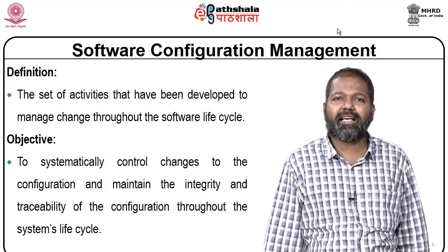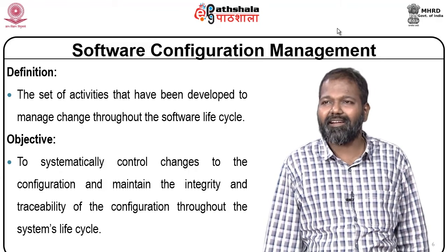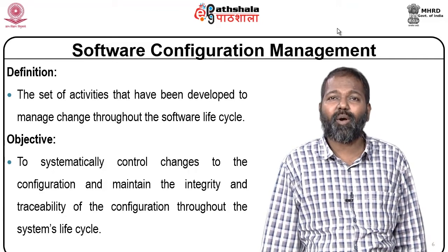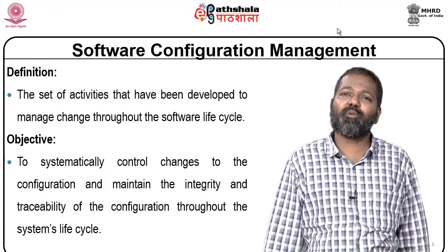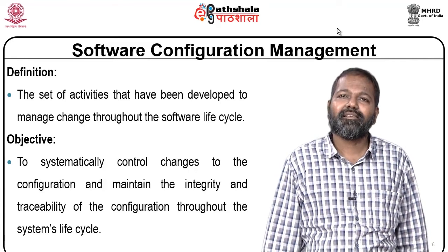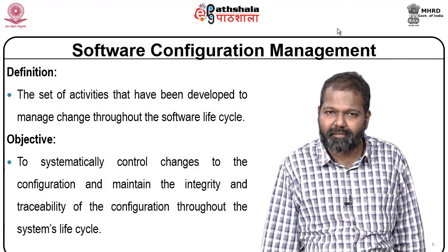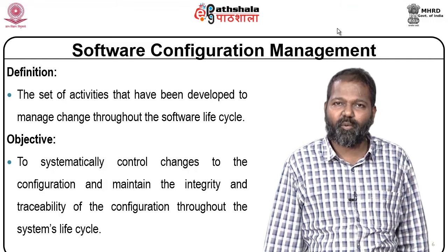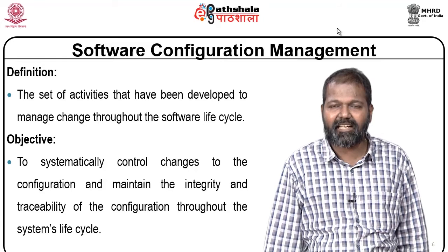You have completed the architectural design, the design has been approved, you are in detailed design. Now when there is a change, your requirement specification document has to be modified, your architectural design has to be modified. In case detailed design is complete and then there is a change in requirement, the changing requirement has to be incorporated in software requirement specification document, architectural design and detailed design.